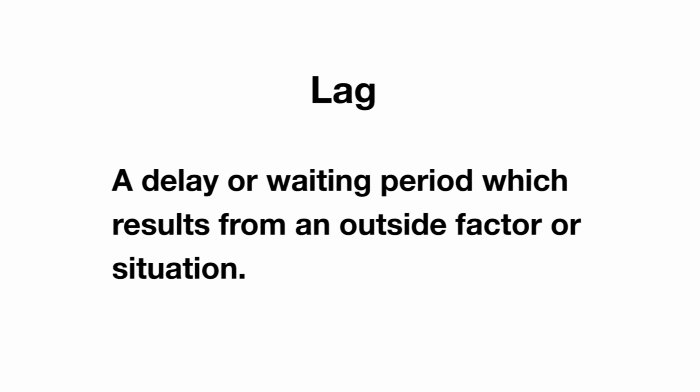A lag is a delay or a waiting period which results from an outside factor or situation, and you need to include these time lags in your Gantt chart. An example is, after you order supplies, there will be a several-day time lag before these supplies arrive and are ready to be used in your project.